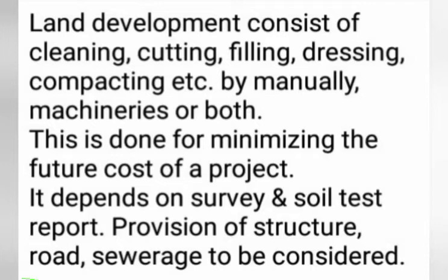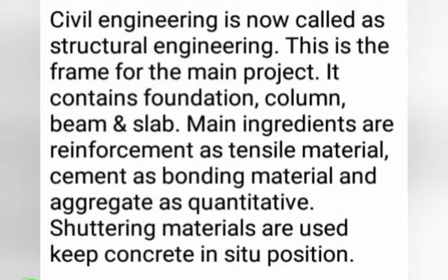Proper land development minimizes the project cost, as the earthwork needed for installation of the main structure may be easily executable and plan-wise. Structural engineering starts from earthwork, then following the bill of quantities, foundation work, beams, columns, slabs, filling, flooring, etc. items are to be executed.